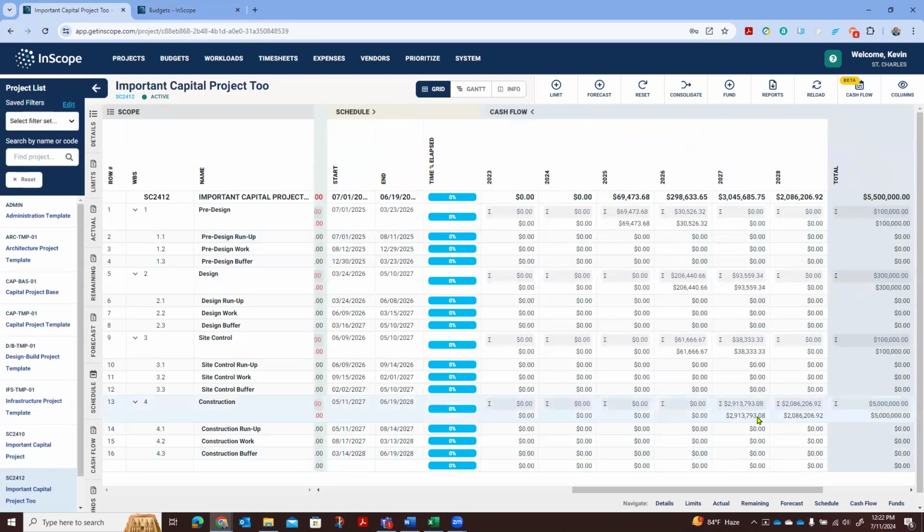And I had to shift this construction contract, or even that this got delayed and pushed out another year. I mean, that's $3 million. Now, all of a sudden, I had $3 million budgeted, and now I can't put that to work this year. And again, that's where those idle CIP dollars, and we know that that happens to us all the time.